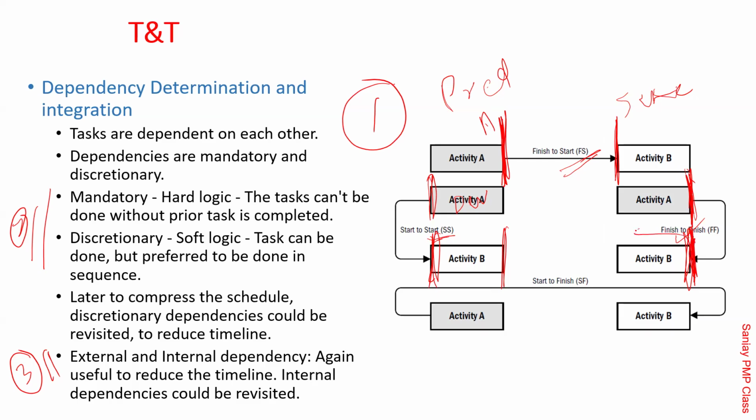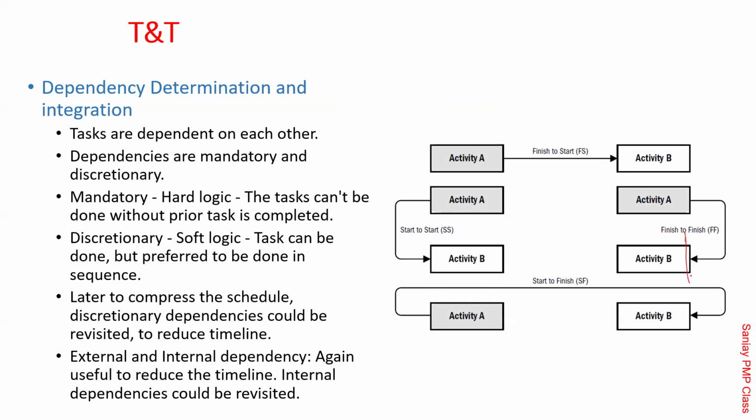Development gets over here, test environment should be there. So I will back calculate. Remember, here I am not going to calculate the finish. I am going to take the finish from development finish and then calculate the start date for that. And that's why it is called finish to finish. Finish of one predecessor is matched as the finish of the successor, and then the start of the successor is calculated by subtracting. It is finish minus duration that will be used as the formula there. So that's the way in which this dependency, FF, works. Is that understood, friends?